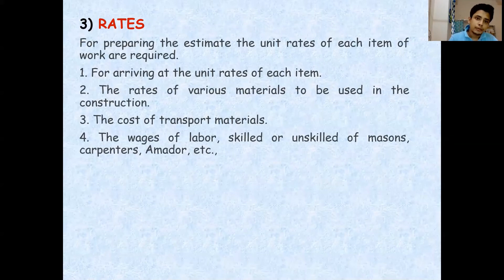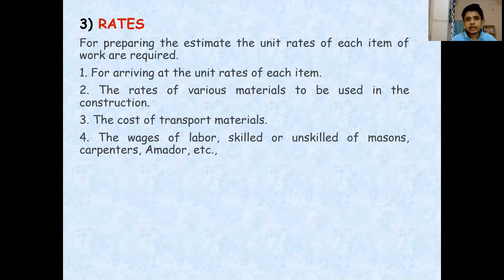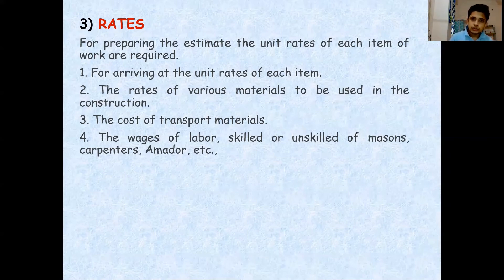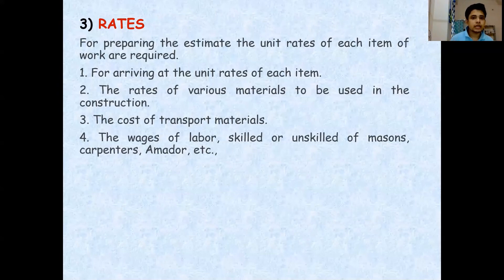We will also require the rates — for example, per bag of cement, per quintal of reinforcement, per cubic meter of sand, coarse aggregate, and fine aggregate. These rates are given by departments such as CPWD or the state PWD, which publish a schedule of rates. If we are in Assam, we follow the Assam PWD schedule; if in Arunachal Pradesh, we follow that state's schedule, and similarly for other states.